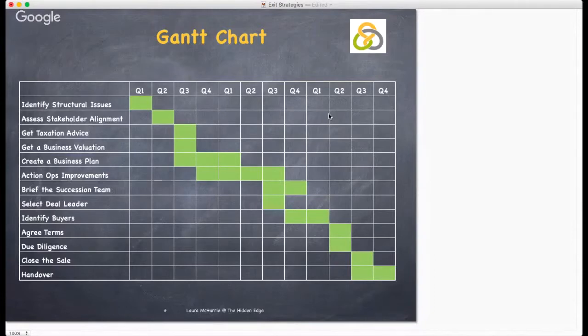Working from your summary time chart, insert into the diagram the various activities or things to do that you've identified by working through the steps we have listed on the left-hand side. Estimate how long each activity is likely to take and block out the appropriate time to complete this activity. And do this more easily, of course, with post-it notes or via the spreadsheet on your computer.